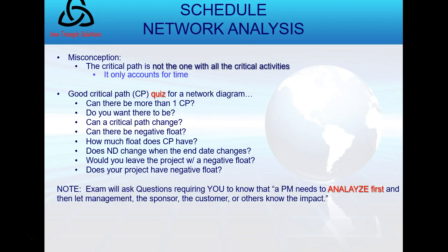So don't confuse those. Couple of quick points. Can there be more than one critical path? Yes, we talked about that. Do you want there to be? No. The more critical paths, the greater risk to your project. Can the critical path change? Yes, especially if you have a near critical path, it could change and become the critical path.